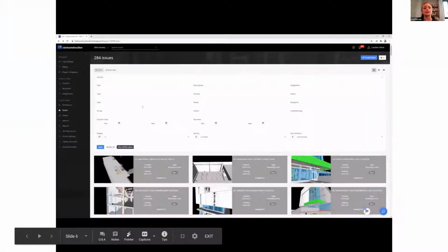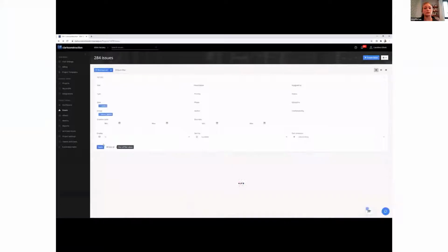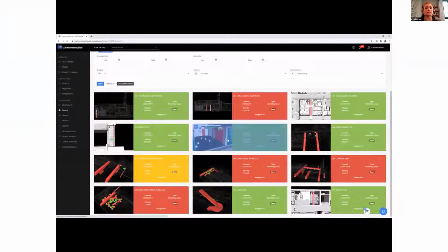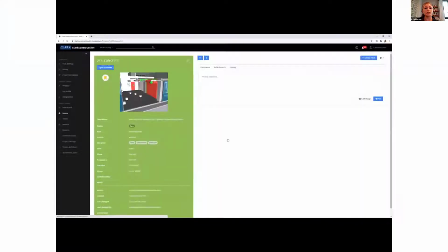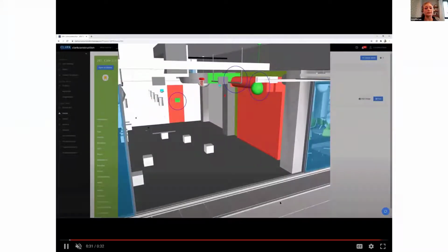So in this particular example, we're just looking at the clash type or the clash test, and then we're filtering by the zone. And then what we do is really just prioritize those issues and then walk through them in meetings or generate reports from them. So that, again, we're not just focusing on, hey, there's a big duct clashing, but it's like, what does that look like within this particular space? How can we inform the movement with that?